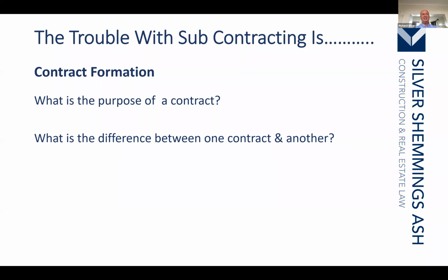And what is done instead is to make the contractor or the subcontractor responsible for the totality of the design. So when establishing there is a contract in place, quite often the effect of having the contract in place is to make the provisions applicable to the subcontractor hugely more onerous. But as we've identified, quite often the subcontract is not in fact signed. So if it's not signed, is it applicable? Is there a subcontract in place at all?